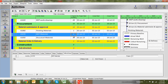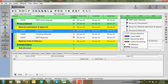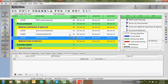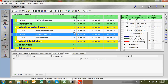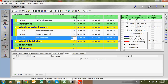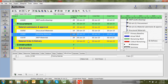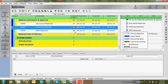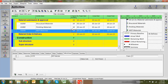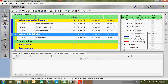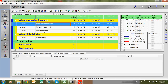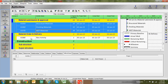Some materials will take only two weeks, but long lead items such as MEP materials may take 28 days because if they are not available in the local market you have to import from outside. You can add 28 days duration for MEP materials activity. For material order and delivery you can also copy and paste the same activity.